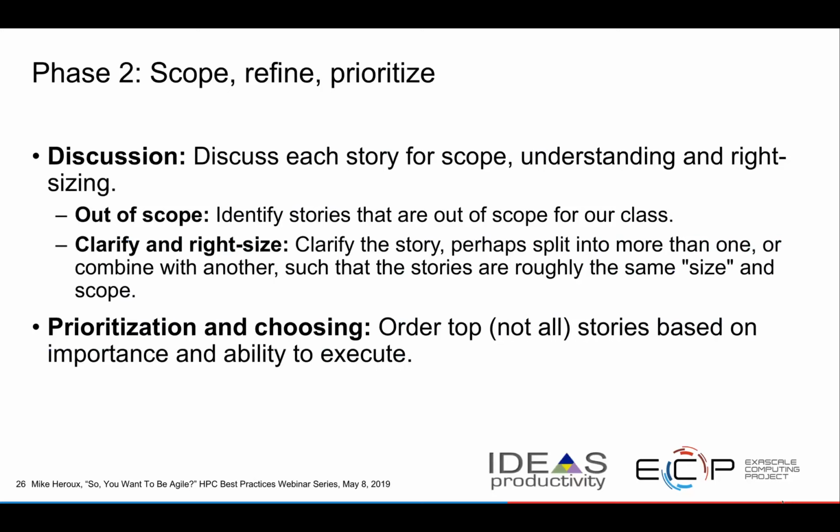And then prioritize and choose. And again, you don't need to order all the stories, but you just need to order the top set that you're going to work on. And then you can set the others aside and come back to them at a later time, after you finished the set that you selected.